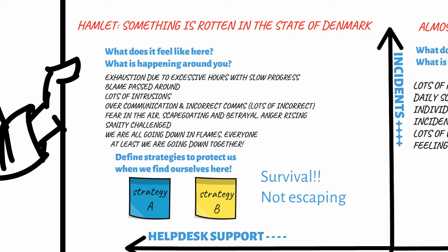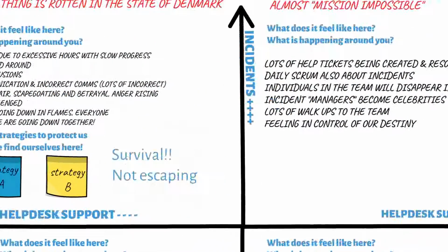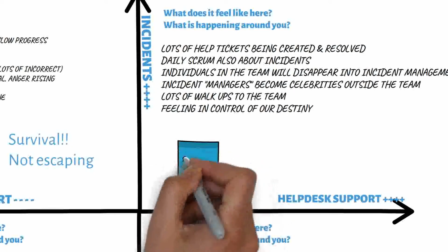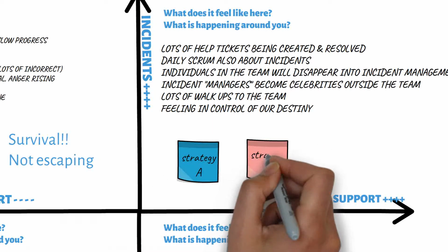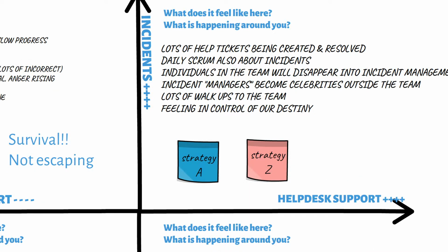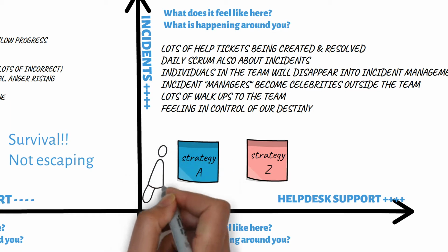The team may actually find out they do have control, and in that instance, we need to go back to the list and select a new item. As a final step, check which, if any, of the strategies are universal and can work in all quadrants, and which can only work in one quadrant.